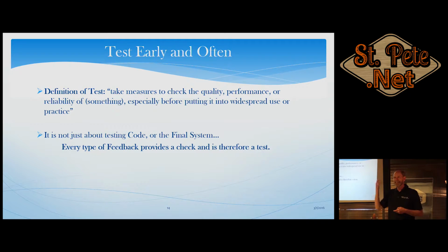When something gets brought into the sprint, a lot of teams are now using the term definition of done so they know when the user story is delivered. What's just starting to emerge is a concept called the definition of ready. Having a written thing somewhere, often a wiki, that says, before a user story can be moved into the sprint, it must meet certain criteria. If it doesn't meet the definition of ready, it's not there. You can test your user stories before you start working on them. Any teams do that?